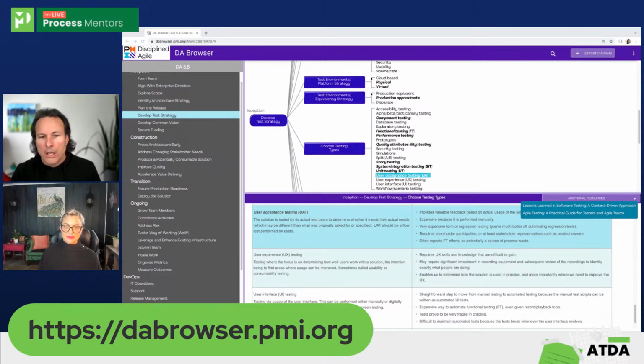a flow-based approach. So there's additional things you can discover rather quickly by getting together and brainstorming a bit on what dimensions of testing, as well as when we need to do those. If we're shifting a lot of the activities we do in a predictive or hybrid way of working to the left, because we're going to be doing those much earlier in our time frame, well, not only do we need to know what dimensions and types of testing we need to do, but we need to have test environments set up a lot earlier.